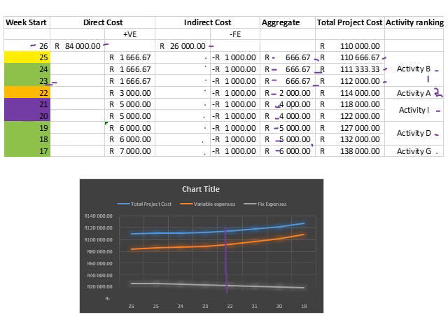You could have also interpreted the jump from here. You can see it's still fairly close to each other. And here we've got a 4,000 Rand jump, and then 4,000, and then suddenly we jump with a 5,000 Rand. So you could have interpreted that you want to stop it at week 20.